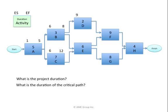The earliest activity D may begin is the day after activity B ends. Therefore, the early start of activity D is 9. If it runs 2 days — day 9, day 10 — the earliest it may finish is day 10. Activity E is a little trickier. Activity E may begin after both activity B and C have completed. I look at the early finish of B, which is day 8, and the early finish of C, which is day 12. 12 is higher. Therefore, the earliest E may begin is day 13.